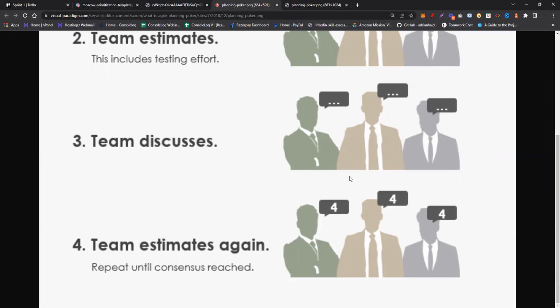So with the same user story, again ask, on my mark 1, 2, 3, you guys say the point again. Now you can realize everyone is going to say about the same or almost the same. Like everyone will say 2, 3, or everyone is saying 5. So don't consider this 4. 4 is not there. It's just an example they gave, but this is a wrong picture. It should be 2, 3, 5, 8. Okay, like that. So until and unless everybody is on the same page or in a close range, like 2, 3 is very close, 3, 5 is very close.